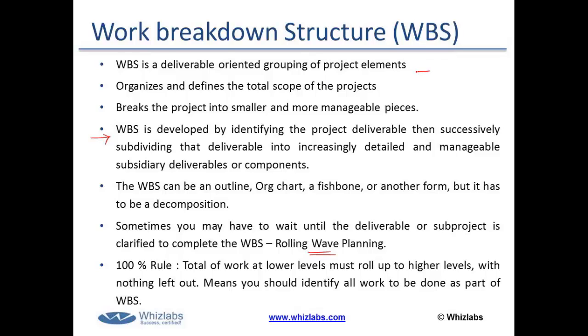Let's say this is the project title. We would find out what the key deliverables in the project are. For example, if it's a software development project, mainly the software lifecycle would be the first layer of the WBS, like design, planning, then coding, and then testing, etc. So that would be the first layer of the WBS.